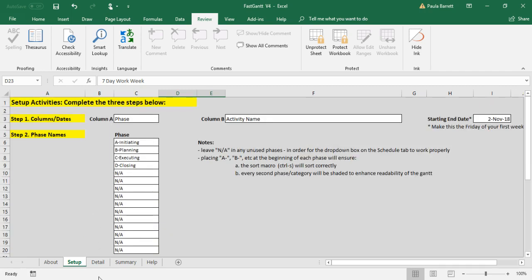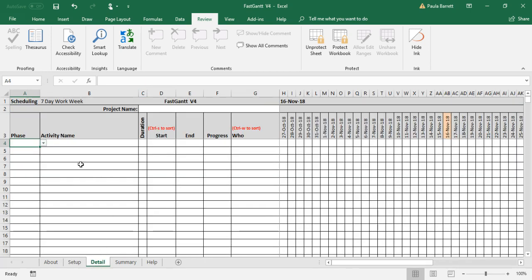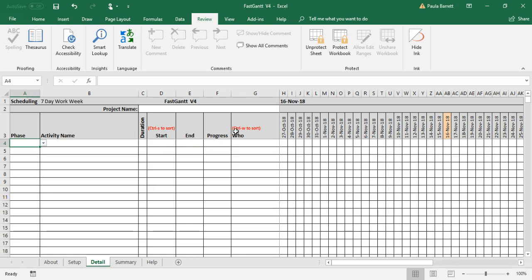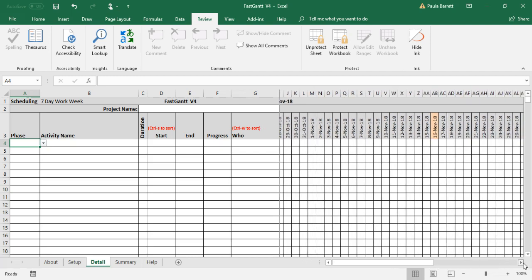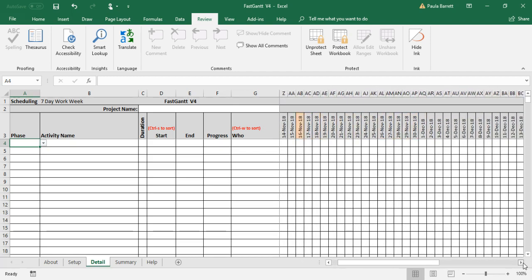So you do that, and then the next step is to move into the detail tab. This is where you'll spend a great deal of your time and where you enter your schedule information. You'll notice that the information that's there is you have phase, activity name, and those two are updatable, the duration of the activity, the start date, the end date is automatically calculated, the current progress on that task, and who's working on it. And then you'll see that there is a column for each day of your schedule. And that goes a fair ways off the right side.